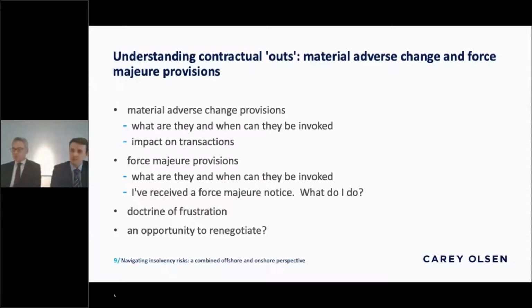There's generally also a requirement for causation to be established, and that is the party invoking the provision would need to demonstrate that the force majeure event triggered the hindering, the prevention or the delay in the performance of the obligation. So that should be direct causation. Lastly, mitigation will also be a key consideration. Is there anything the invoking party could or should have done to mitigate or avoid the event or the consequences of the trigger event? So look closely at the facts in the round.